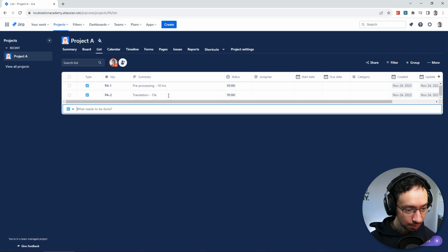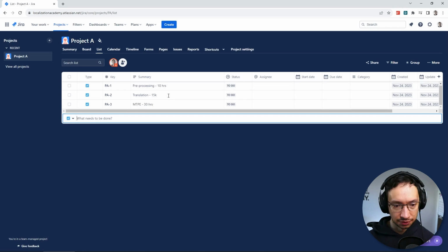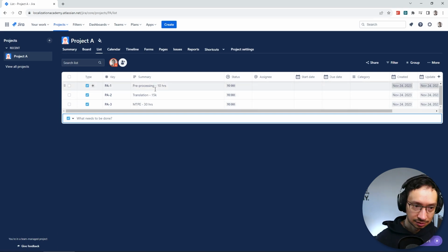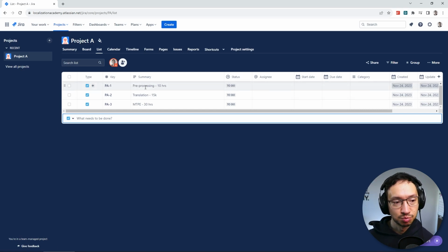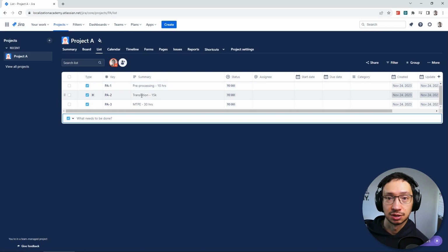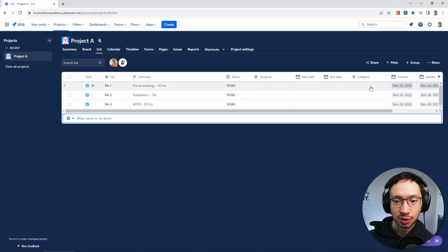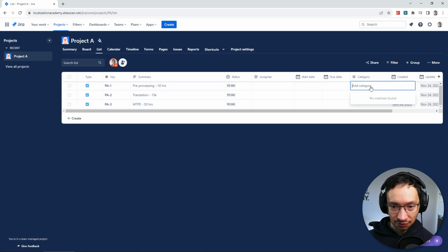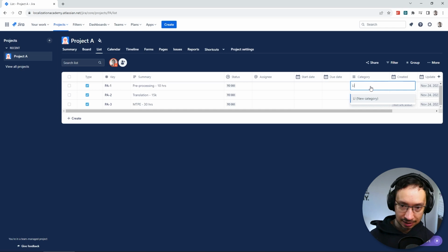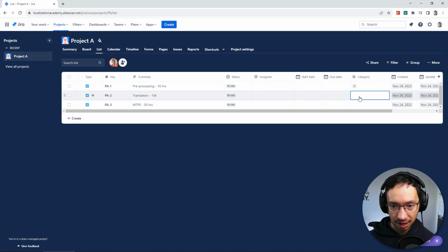I'm going to add one more, machine translation post-editing, which we do for 30 hours. And here, if you've seen any previous videos that I do in this series, you know that these are 3 tasks that belong to 3, let's say, subcategories or groups. So pre-processing is language independent. It's done for every language. Translation is done for German, Japanese, and machine translation post-editing is done for French and Korean. And that's where we're actually going to utilize the category field. So I'm going to tag or mark this as the language independent category.